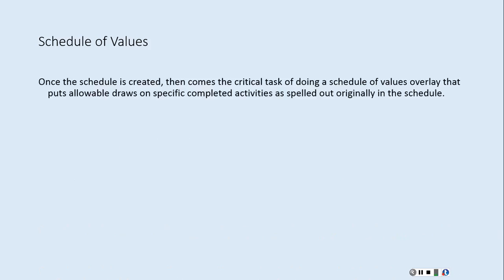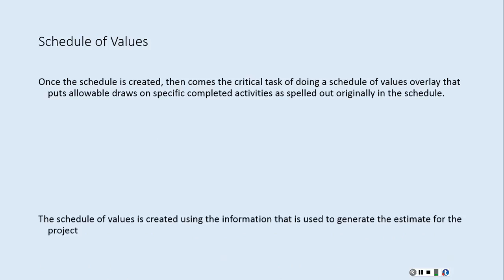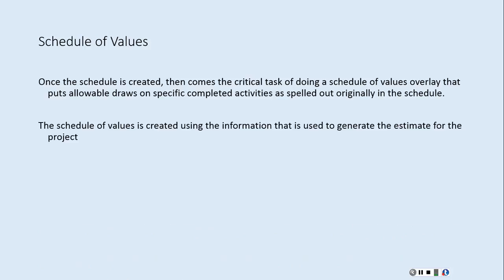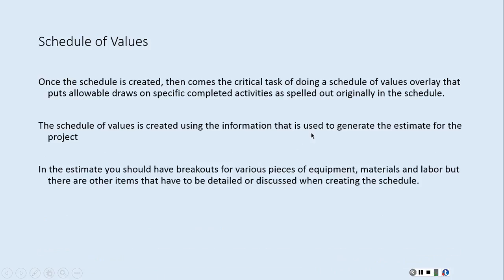When we talk about the schedule of values, once we have our original project schedule created, somebody has to break out the estimate itself as it was originally laid out in our schedule, or the schedule that we were given. Once we have that estimate, if we recall, we had labor and materials for each line item in there. What we have to do is compile the different line items and put them in the individual division numbers in order to create this document.